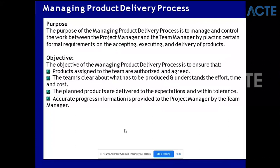Will auditors give instructions? They will give observations and NCRs - Non-Conformance Reports. An observation means it is not critical but please try to follow them or create an action for the next time. An NCR is a non-conformance report - that you are not conforming to what you agreed. If there is an NCR then you will have to go back and make changes and get the NCR removed. They may give a non-conformance because the budget is high, or your people are not there. It can get escalated to management.